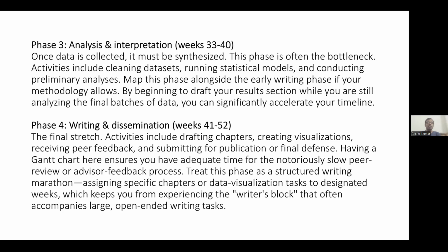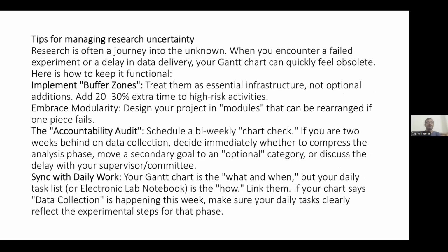Having a Gantt chart here ensures we have adequate time for the notoriously slow peer review or advisor feedback process. Treat this phase as a structured writing marathon. Assign specific chapters or data visualization tasks to designated weeks, which keeps us from experiencing the writer's block that often accompanies large open-ended writing tasks.